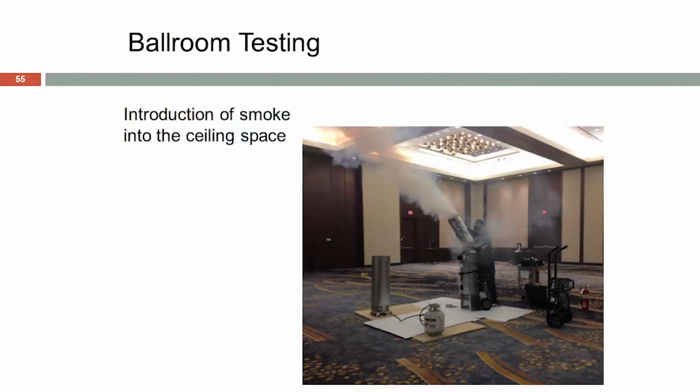Here's a picture of it. The smoke is being formed. The design intent was to keep the exit signs visible, so we filled the volume up, waited till the fire marshal said, okay, that's good enough, let's turn the systems on while you keep adding smoke and let's see what happens.